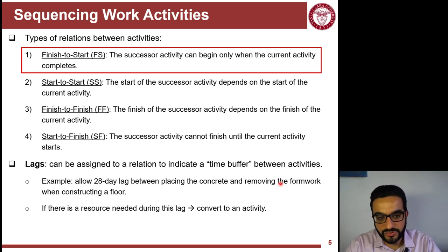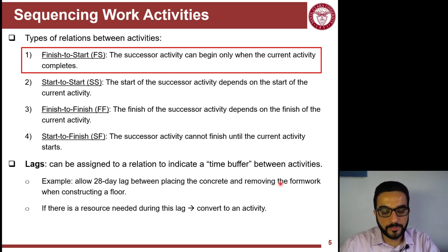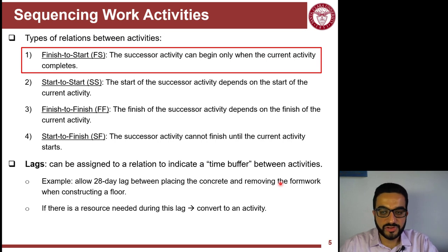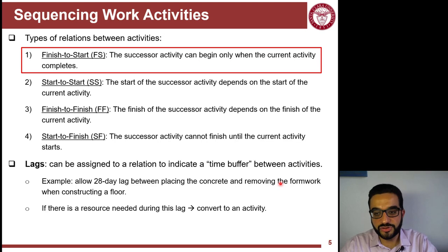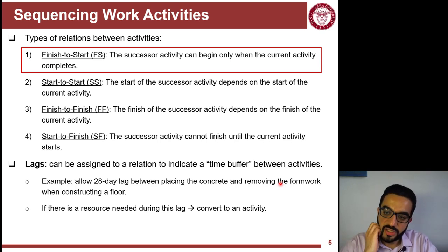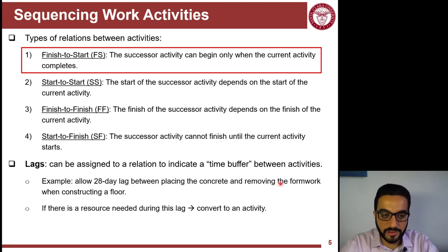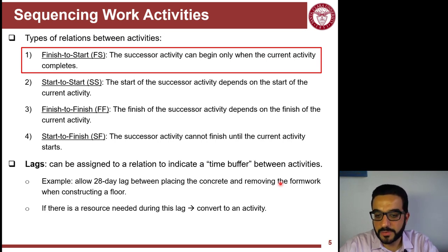We'll focus on Finish-to-Start going forward, but Start-to-Start, Finish-to-Finish, and Start-to-Finish are all available for representing more complex logic when you want to make your schedule more efficient and compress it.